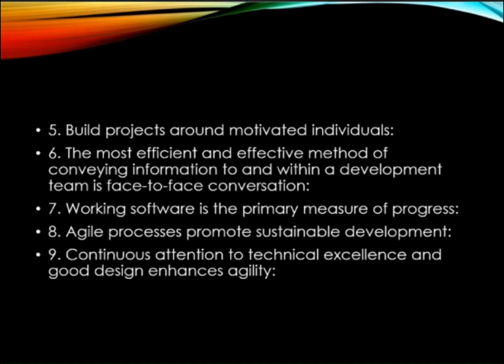Our sixth principle is face to face conversation. Sorry, face to face conversation is the best. Talking directly clears doubts faster. Suppose a tester explains a bug on a call, the developer understands it immediately and fixes it on the same day. Our seventh principle is working software is the primary measure of progress. A working product matters more than documents or reports. During the sprint review, the team shows a live demo instead of just showing PowerPoint slides.